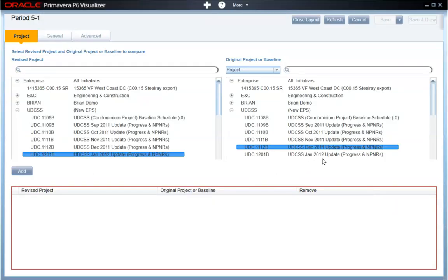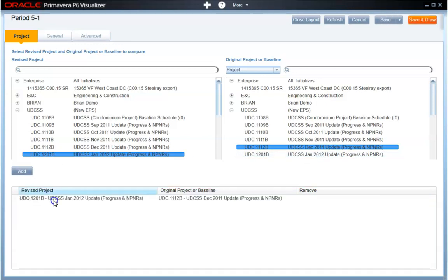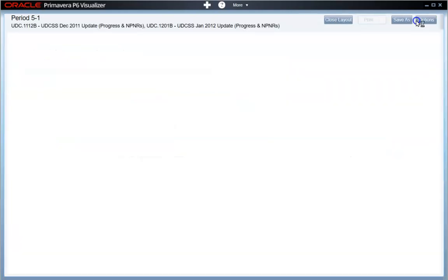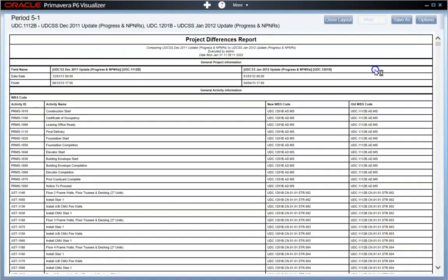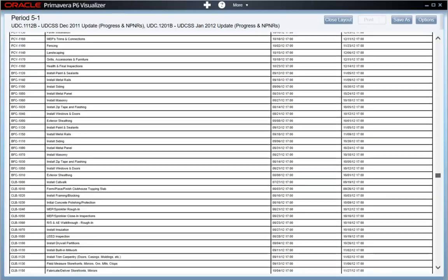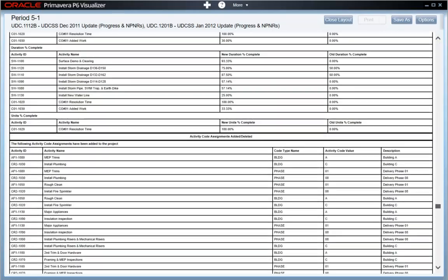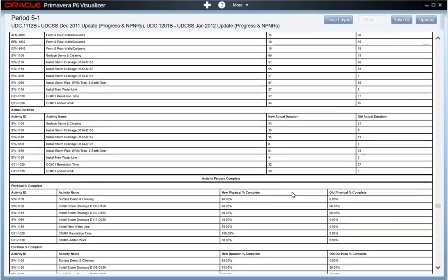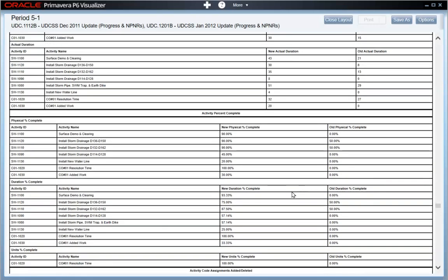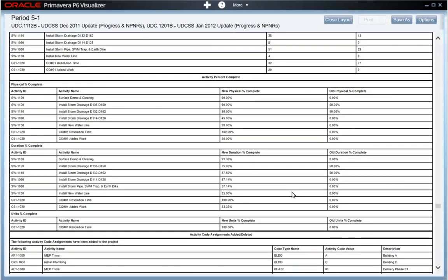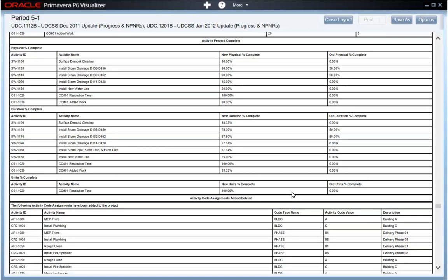You might start inside of Primavera with Claim Digger, their schedule comparison report inside their visualizer. It would compare the schedules and give you a list of everything that changed. Remember, you need to explain why the finish date was pulled in by over 2 months. Where do you start? You've got so much data here, and the answers are here, but you could spend many hours or even days figuring this out.